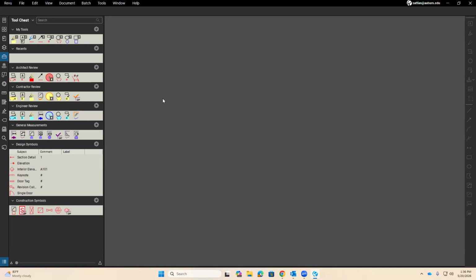Anyway, here's why Bluebeam became really popular. Over the last 15 or maybe 20 years, what's changed in the industry is the popularity of guaranteed maximum price contracts, as in early contractor involvement, meaning the design is not fully finished when I start coming out of the ground. Why? Because the owner wants their project yesterday, right? That's pretty much every owner. They want their projects done fast, and therefore the construction team and the architect will come together and start producing these drawings. As soon as the foundation drawings are ready, we'll start coming out of the ground and let the design team do what they're doing, right?